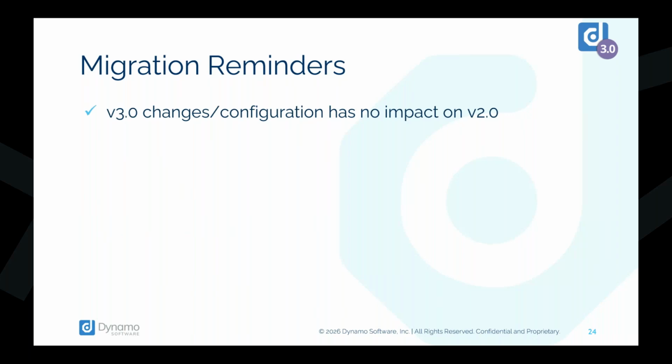What can be a little bit tricky is once you've run the conversion tools to migrate over to 3.0, you don't want to continue to make a lot of configuration in 2.0 because that wouldn't get brought over again.